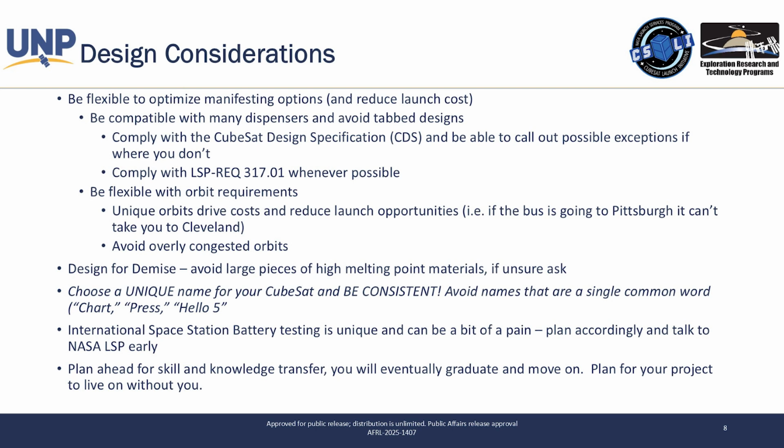And then also, you guys are students. You're going to graduate. You're going to have internships. Plan ahead. Eventually, you're going to move on. Plan for your project to live on without you so that knowledge can actually be transferred and shared. You would not be surprised how many times we have members graduate and they forgot to share the password on a certain document, and a team is shut down for a while until they can get that information. Also, you'd be surprised how much time teams lose because someone they were working with graduated or moved on and they had all the knowledge, and you're trying to bring other people up to speed, and that just limits your ability to be ready for a launch opportunity. Plan for knowledge and skill transfer.